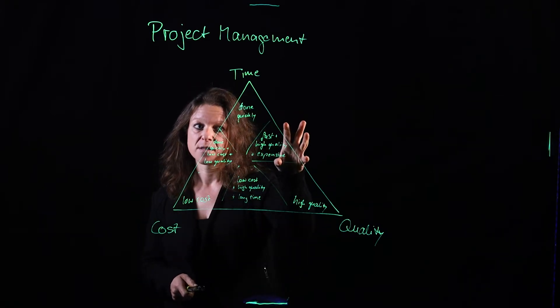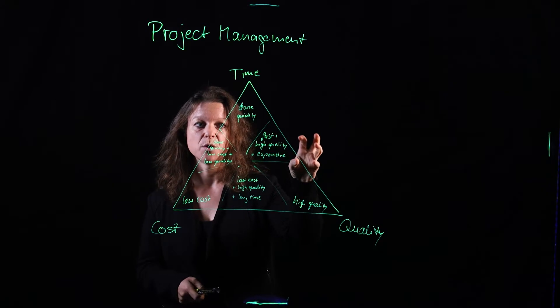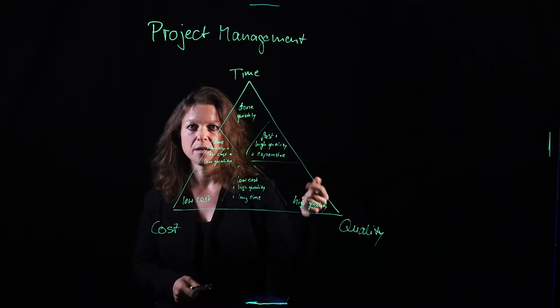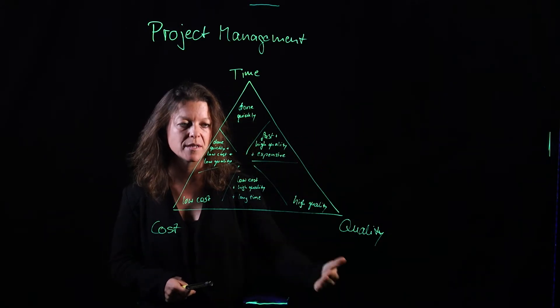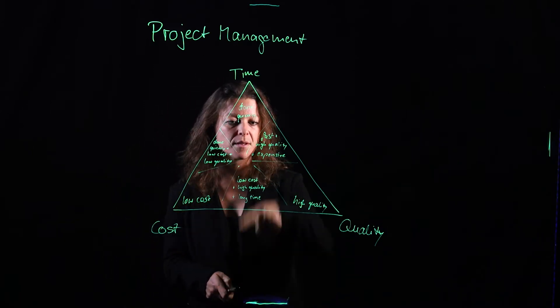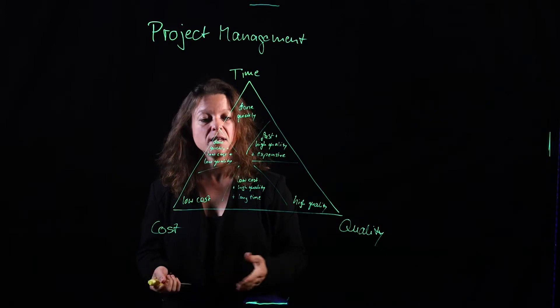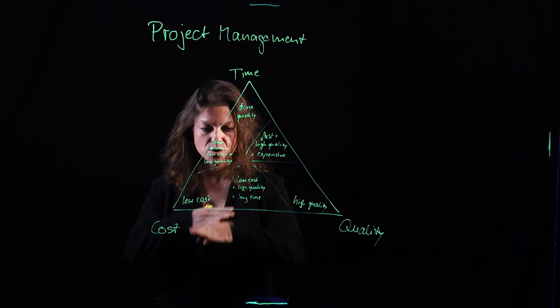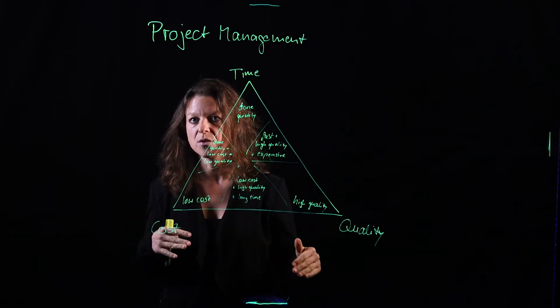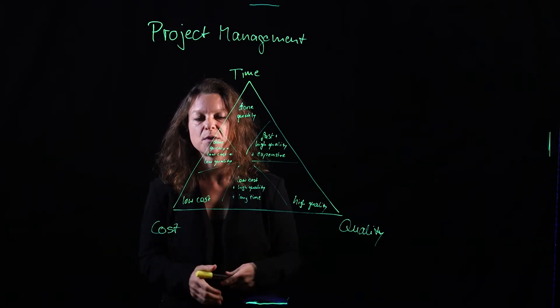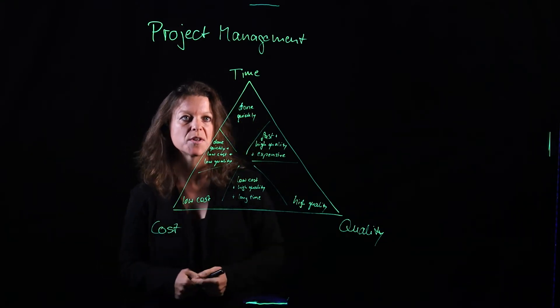And then fast and high quality and expensive, that's what we'll often have when we just need high reliability systems and we need to get them to the market. And down here, low cost, high quality and long time, if I know that cost is just my limitation but I do need the quality, then I will have to sacrifice the time for developing that system over a longer period of time.